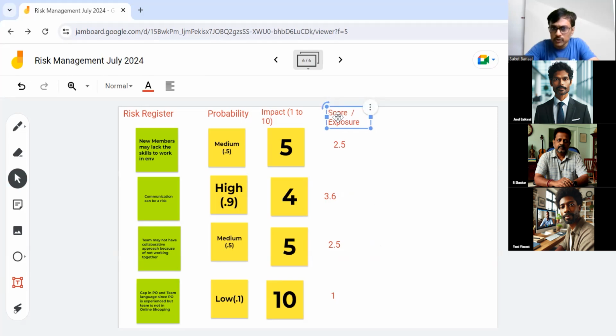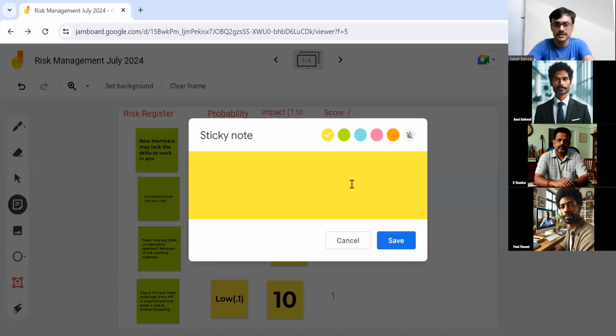Now, directly, you probably don't prioritize based on that. In your probability and impact matrix, there will be a definition which says beyond 3, call it very high or whatever. So you may say the risk is high probability but moderate impact. So you have a probability and impact matrix, and based on that we will say, oh, this is considered very high, as per agreement.